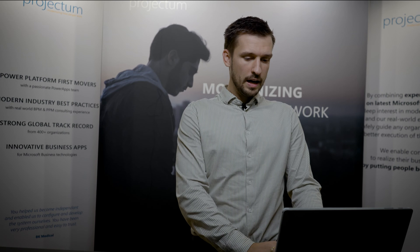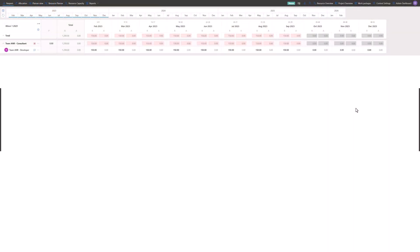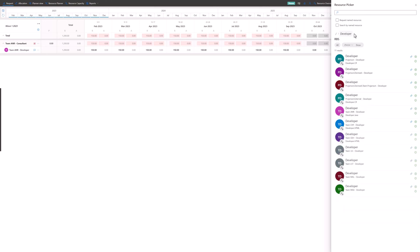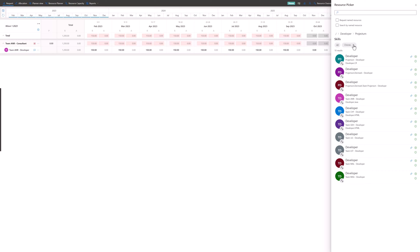I can go into Team Planner and go into my request picker. I can decide I need a developer. When I have chosen that I need a developer, I can say, okay, where in the organization do I actually need this developer from? Because we could have several departments or teams that have developers. I can choose to say I want it open — I don't care where the developer comes from. Then next, I'm allowed to choose which skill sets this developer should actually have.